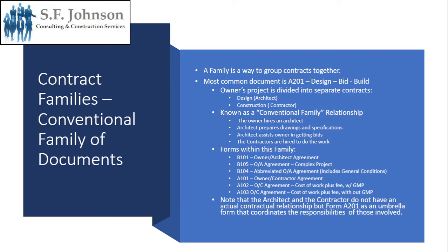Okay, so among this family of documents, it should be noted that there is no direct contractual agreement between the architect and the contractor. So in order to take care of that, Form A201 is an umbrella form that coordinates the responsibilities among all parties, including the architect and the contractors.